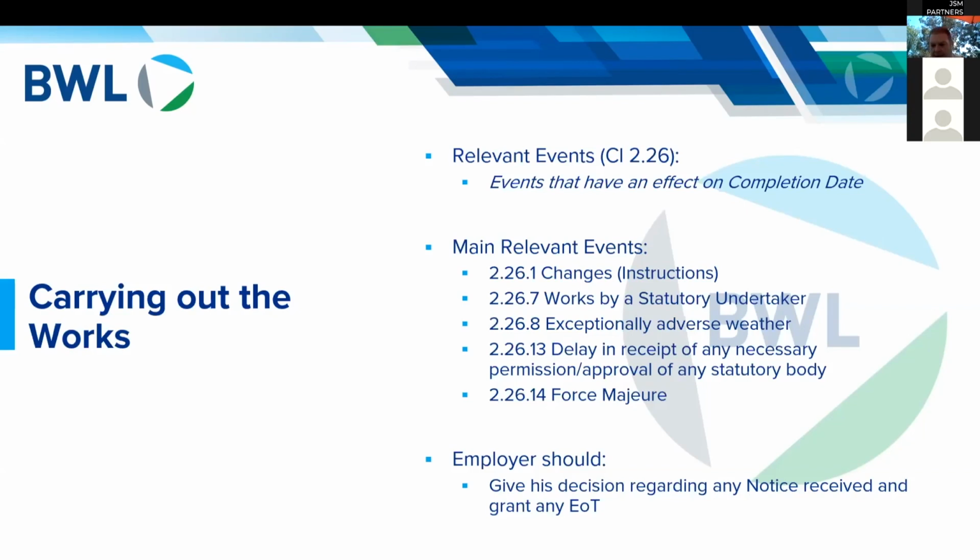Now, the question then becomes, well, force majeure, people think it has a common meaning, and I guess the bad news is that it doesn't. The term force majeure is not defined in the common law, and it's deemed to be what we call a creature of contract. So if you're looking to understand what force majeure means, and you don't define it in the contract, then unfortunately, if you turn to the courts for a definition, you're unlikely going to get any help.